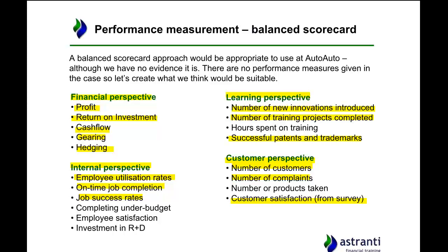And even worse, if it were to overshoot by twice and it were to take 4 weeks at a cost of £4 million Upland dollars, it's now in fact lost you £1 million Upland dollars, because the commercial viability of that project was only 3 million Upland dollars. And that's also where the importance of budgets comes in, and completing to budget, or even better, under budget. The more often that you are completing under budget, the more efficient your organization is running.